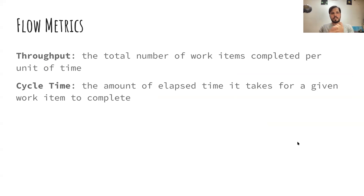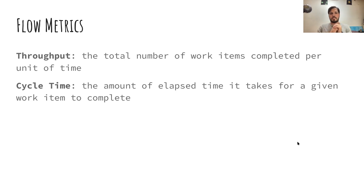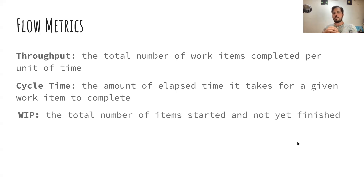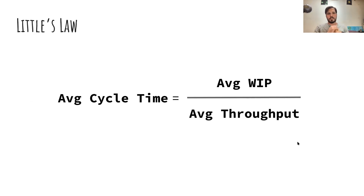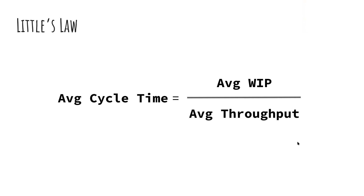I've introduced two of the flow metrics — throughput and cycle time. Throughput is the number of work items completed per unit of time. Cycle time is the elapsed time it takes for a given work item to complete — from when it started to when it finished. The third flow metric is WIP, work in progress: the total number of items started but not yet finished. These three flow metrics come from Little's Law. We don't want to calculate Little's Law because it's based on averages we can't really use for forecasting — but it describes the relationship between these things, and understanding that relationship is how we become more predictable.